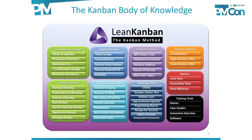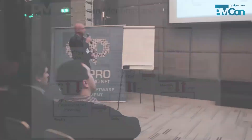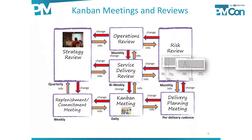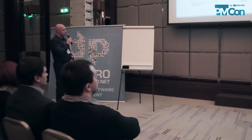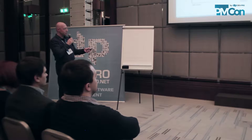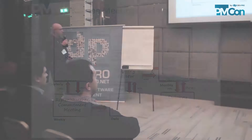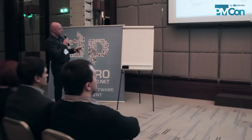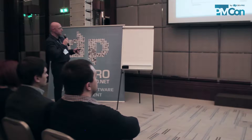These are the different meetings and reviews that happen in Kanban. If you work in a medium to large-size IT organization, you probably have similar meetings. The most common one is similar to a stand-up in Scrum — it's a Kanban meeting that usually happens daily. There are also delivery planning meetings, replenishment and commitment meetings, risk reviews, service delivery reviews which are bi-weekly, operations reviews, and strategy reviews with customers on a quarterly basis.